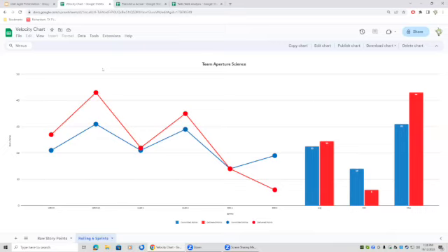if people are interested in having a radiator they can show their stakeholders, I prefer something like a say-do ratio. How many points were in your original sprint plan that you actually finished? And then if you want to show velocity as well, you can, but velocity doesn't tell the whole picture because all the points you finished may not have been in your original plan. I like teams to be predictable, like make a good sprint plan and deliver what's in your sprint plan. And if you can't, let us know why. And then maybe as an organization, we can change to make it better.